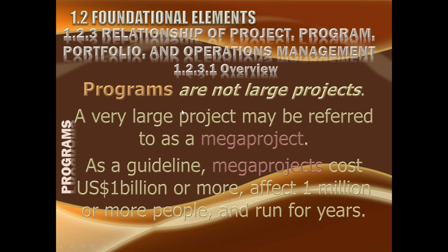Some people think that programs are large projects, like I said, mega project or large project or huge project. So just the size of project does not mean that it makes it a program. A large project does not become a program, because I said until and unless a project is focused on delivering a deliverable. You see, constructing a house is a deliverable. Constructing a colony is also a deliverable. Colony could be a mega project, but colony, until and unless it is only focused on creating the colony, constructing the colony, it is a project.